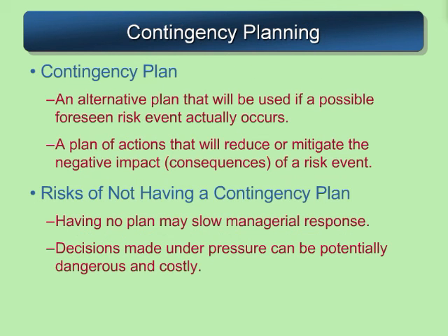One of the risk responses is contingency plans, and having a plan to put in place once a risk event occurs is a good thing, because what happens normally when those events happen is that people are panicked and challenged. If you have a book or a manual you can go to that tells you what to do instead of having to figure it out on the fly, that will probably in the long run be cheaper and more effective than if you have no plan in place and the event does occur.